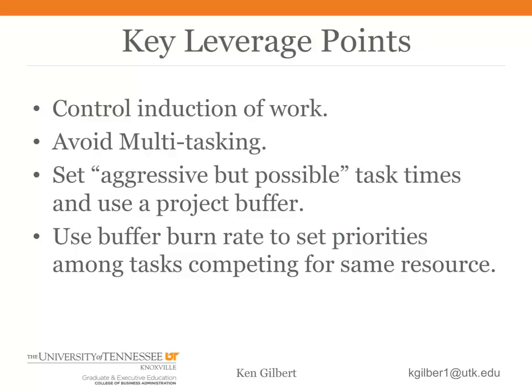Here is what I would want you to remember about this presentation. The very foundations of critical chain project management. Controlling induction to keep WIP and flow time shorter. Avoid multitasking by not starting a task until you have everything you need to complete it. Schedule tasks aggressively and build the needed buffer into the project. And use the buffer burn rate to prioritize work.